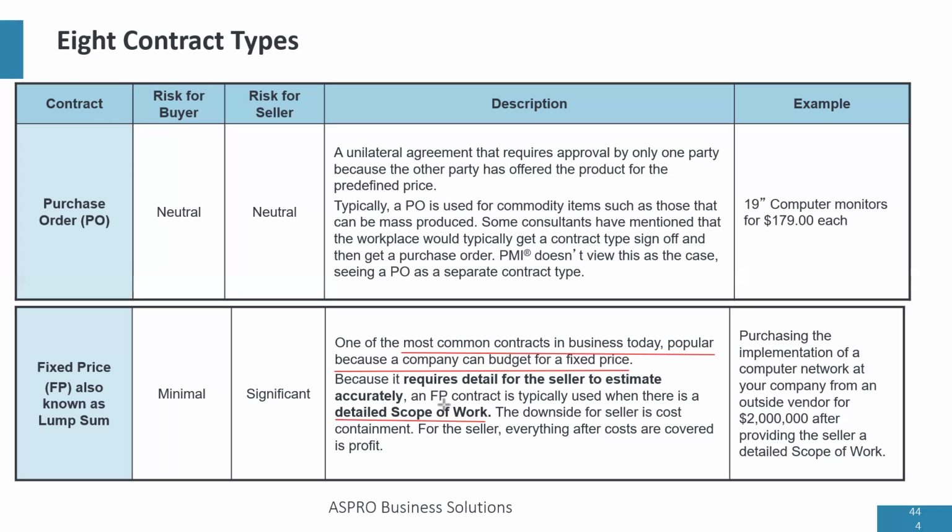And he's surprised that you have all these details. So using a fixed price contract comes when you have a lot of information about the contract to be awarded. So much information that you can estimate it yourself. So if that's the case, you go with fixed price contract.